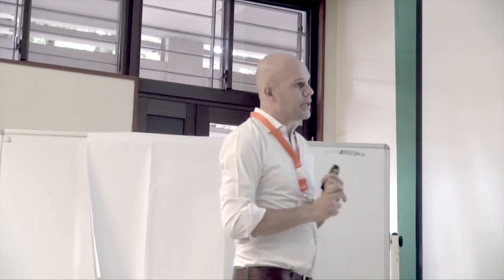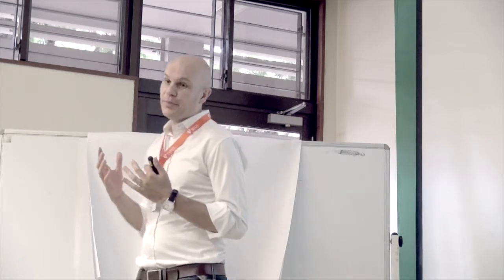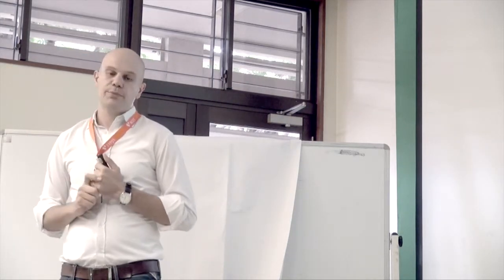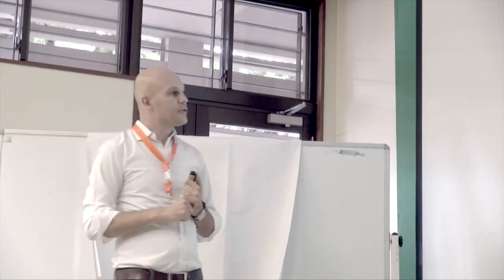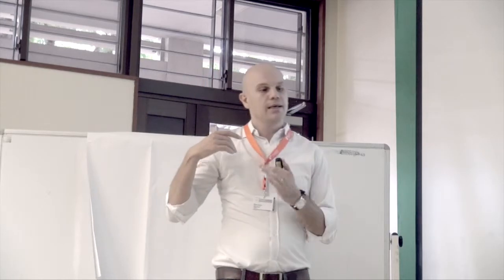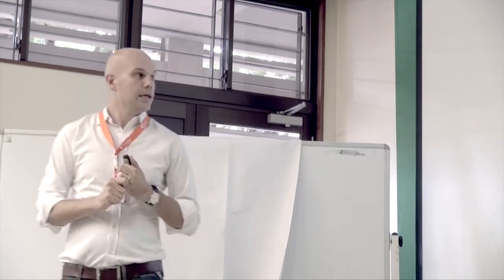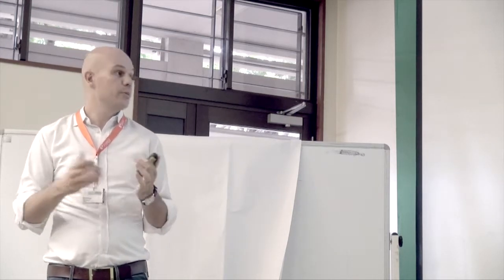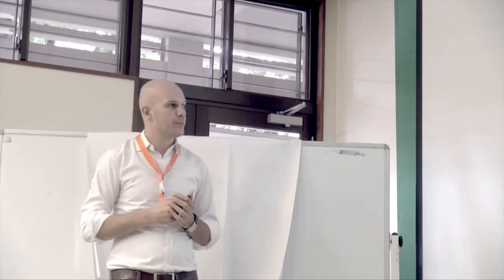And then we have a test exit report and lessons learned. Lessons learned is one of the most important documents, I feel, because it's summarizing how we work, what kind of problems we had, what things we did really well. So that's one of the key documents I see, and that's something we go back to, and we also share with the PMs. We also work on our own processes to improve them, which is part of the continuous improvement of our QA processes.